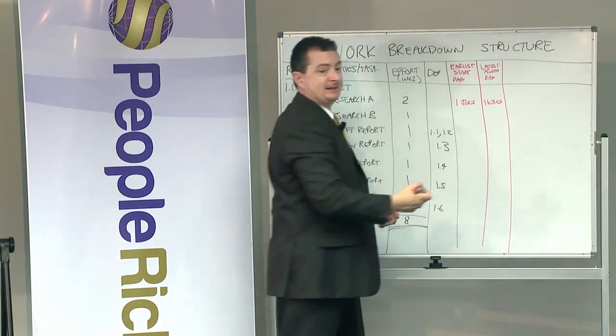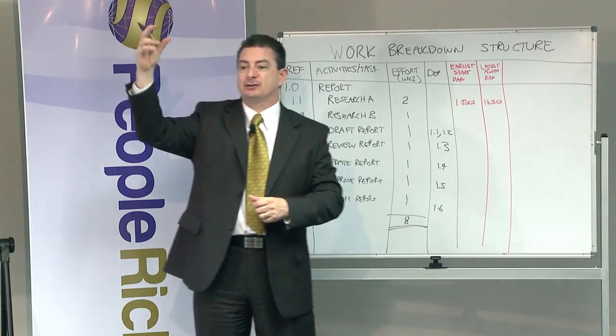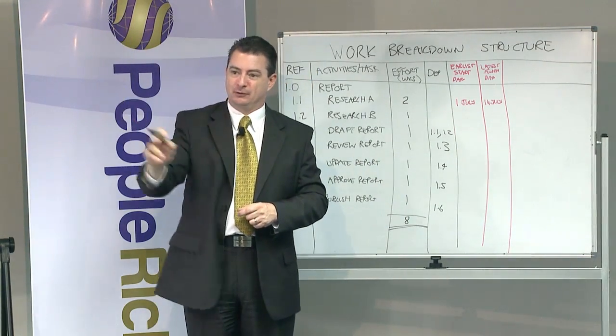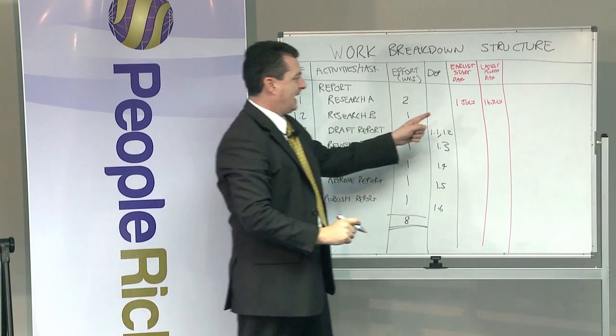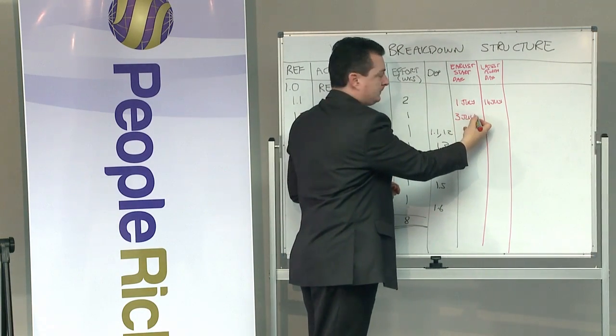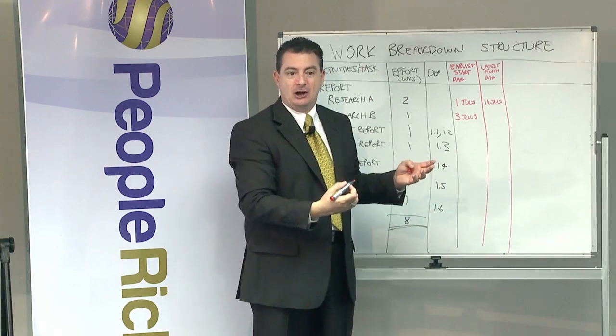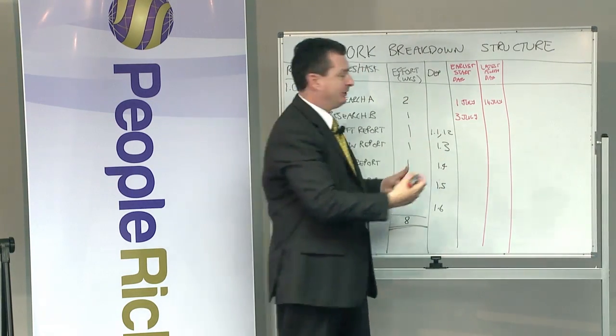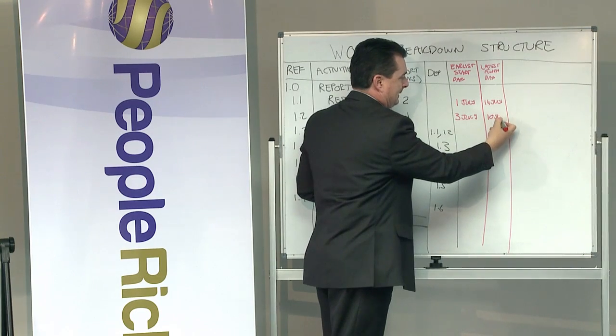You might have realised that we want to keep that same person for 2 days on that first task and then move them to the second task. So we'll start this next one on the 3rd of July. Does everyone see that? The computer automatically knows that if it goes for a week, it's going to finish on the 10th of July.